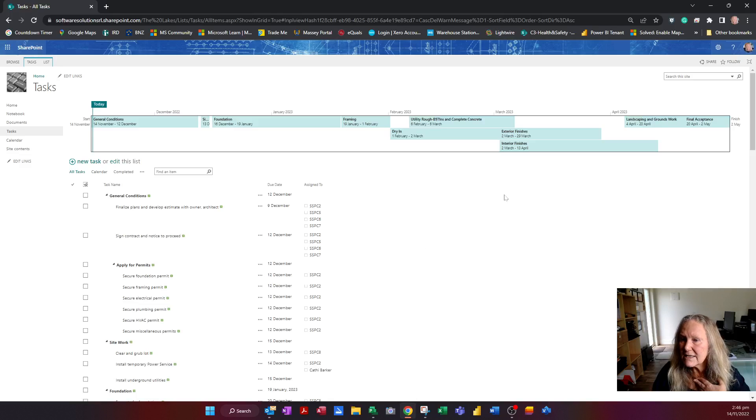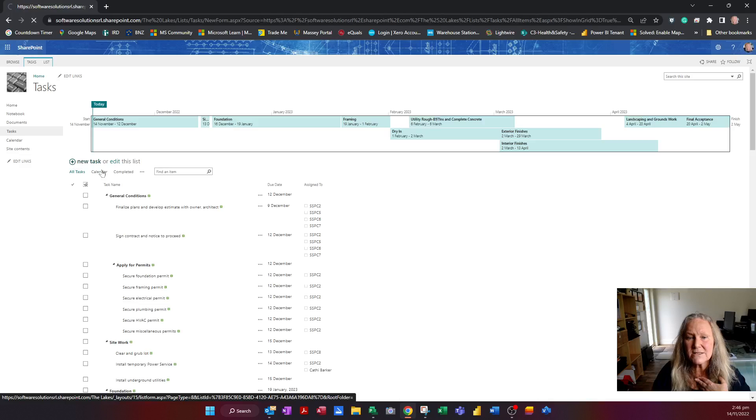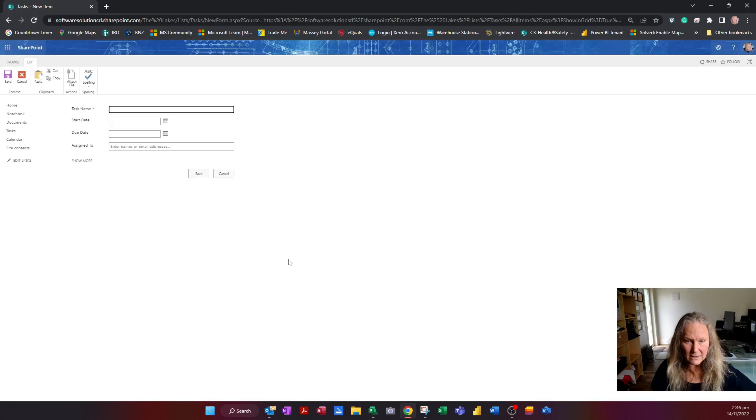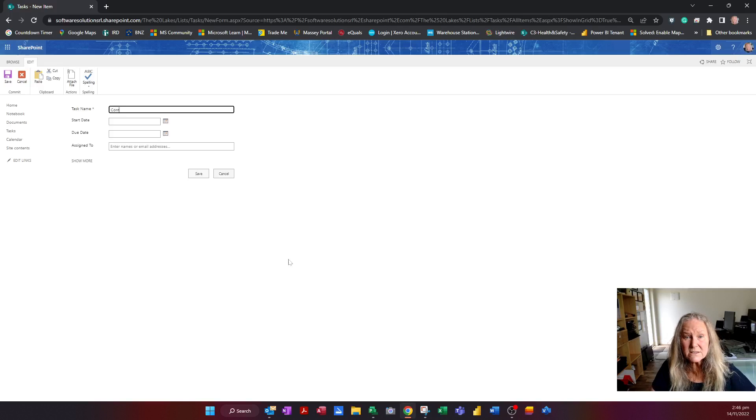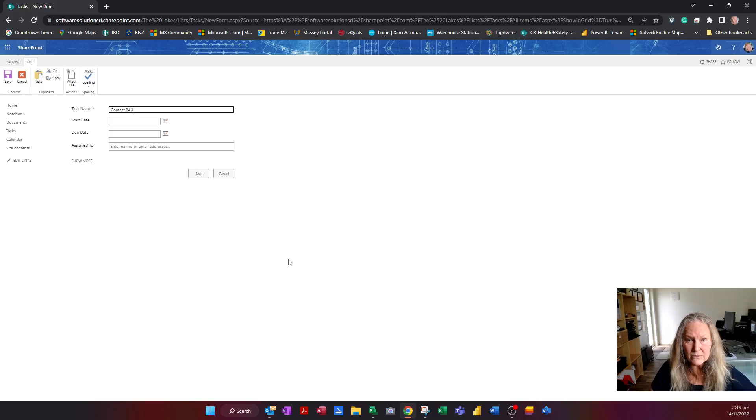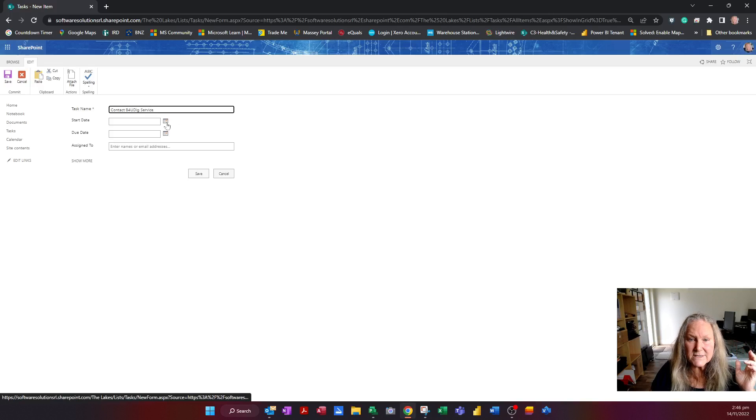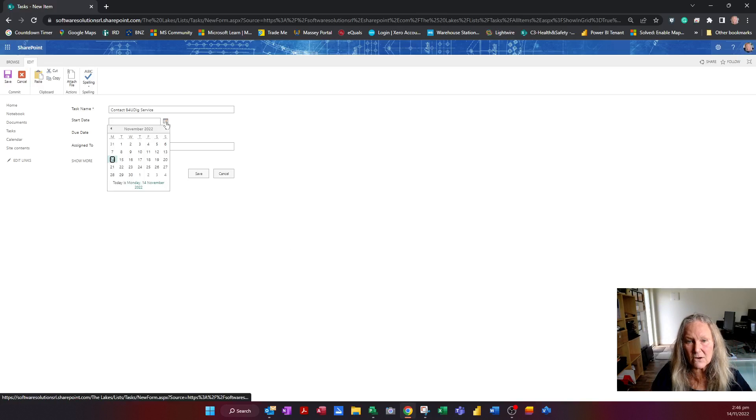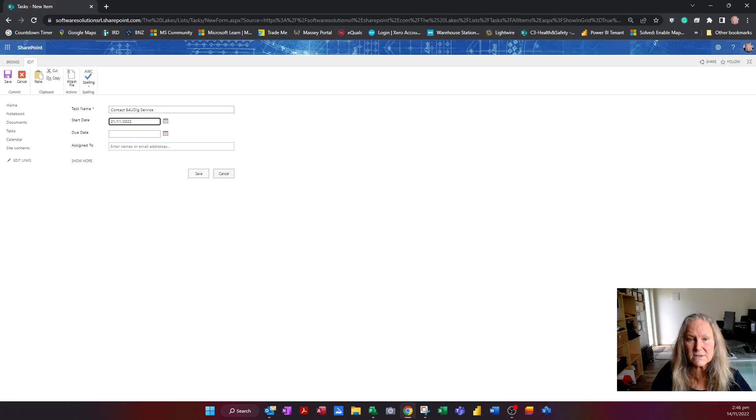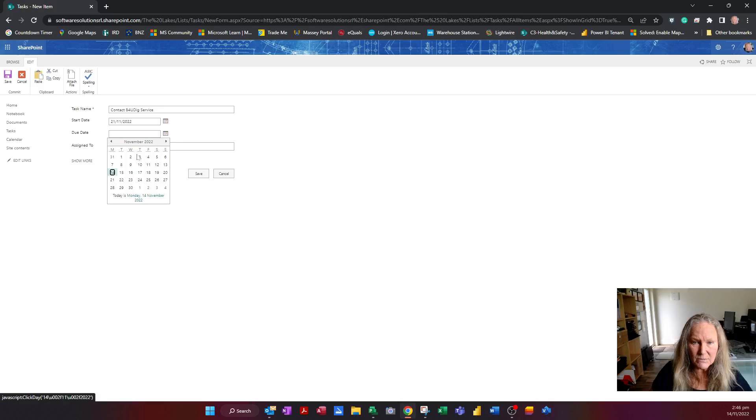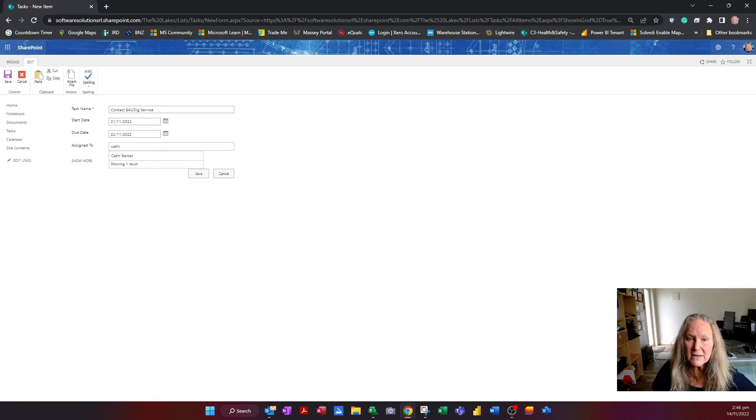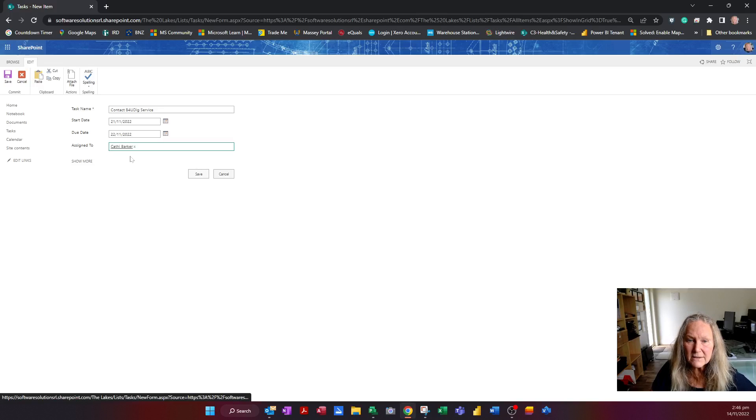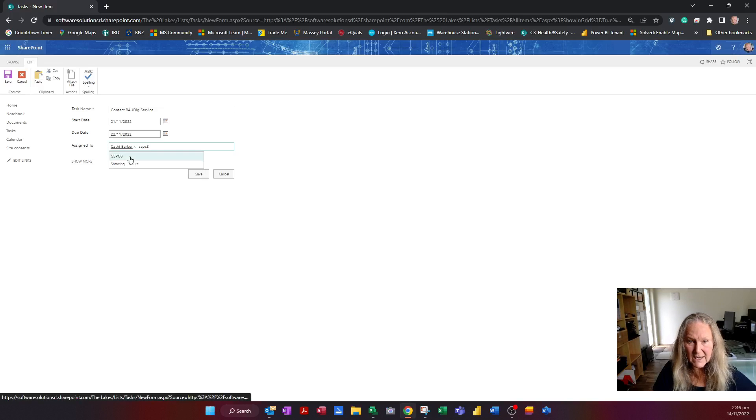I can even add a task quite easily just by hitting this option here. And so if I suddenly think of something like I need to contact Before You Dig service, and I want to start that on a particular day, maybe the 21st, and I need to have that done by the 22nd. And I'm assigning it to myself, Cathy Barker, but maybe also SSPC8.